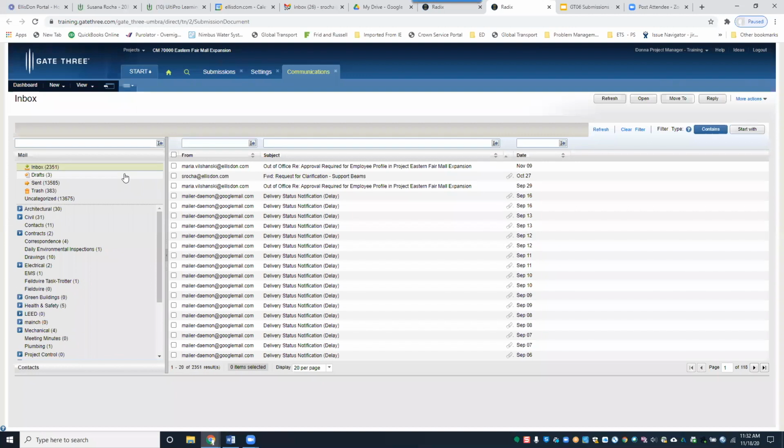So you should create a transmittal when you're sending it to the primary consultant. And you should also create a transmittal, which I'm going to show you, when everything's finalized and approved by the primary consultant and being pushed back to the subcontractor. So there's 2 stages where you should be sending a transmittal. That was one stage when we're pushing it out to the primary consultant. And the next stage I will show you when we have to package everything together and send it to the sub.